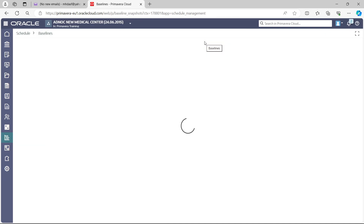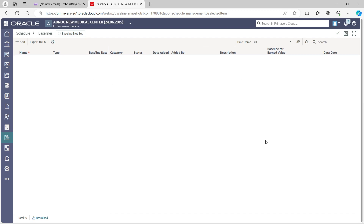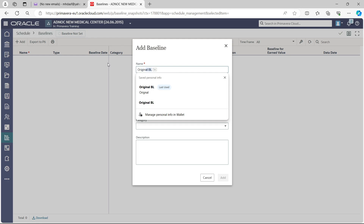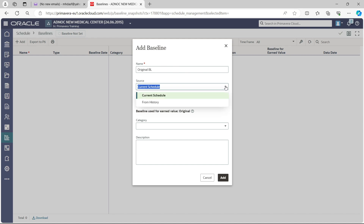Select the Baseline tab. You will see there is currently no baseline assigned for this project, so click the Add button. You can give the baseline any name that is easy for you to remember. For Source, you can use the current schedule or make it from history if you have a previous version. For Category — this is the type of baseline you are assigning, which depends on your company or project requirements. Custom means it is generated based on your requirements rather than assigned by P6 Cloud itself. If you have no specific category requirement, skip it and in the Description field write 'Original Baseline'.